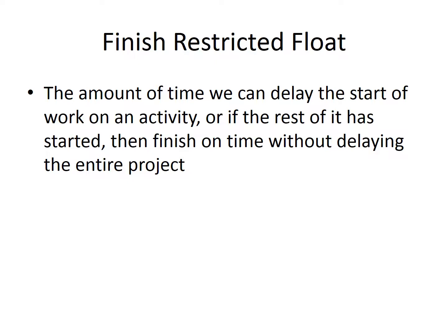The opposite is true of finish restricted float. That's the amount of time we can delay the start of the work of an activity, or the rest of it that has started, and then finish on time without delaying the entire project.